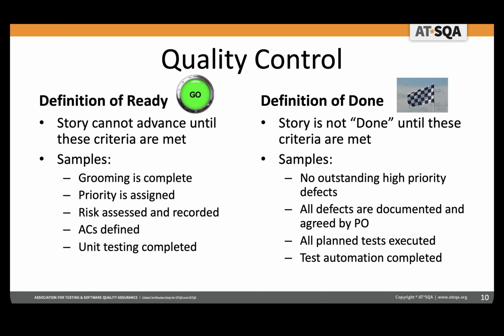But it's whatever works. And often what is done is you kind of define this as you go. So you want to define it up front, obviously, but you may need to refine it as you go because you say, you know what, I'm getting software through from the developers and I know they haven't unit tested it. Great, then we need to add that to our definition of ready, and they may need to prove it, that they've actually achieved the level of coverage that we expect.